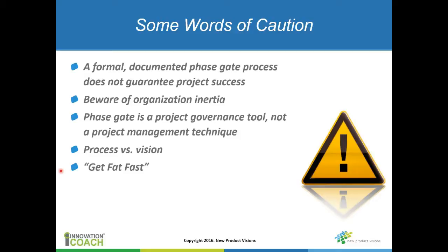So you start with low investment, and as you go through the gates, basically senior management is making an increasing investment in the project. But there is data that suggests that, especially for higher uncertainty projects where you might have a lot of uncertainty, unknown unknowns and so forth, increasing the investment, particularly in terms of resources at the beginning of the project, may lead to more successful new projects, new products. So you need to think about that.